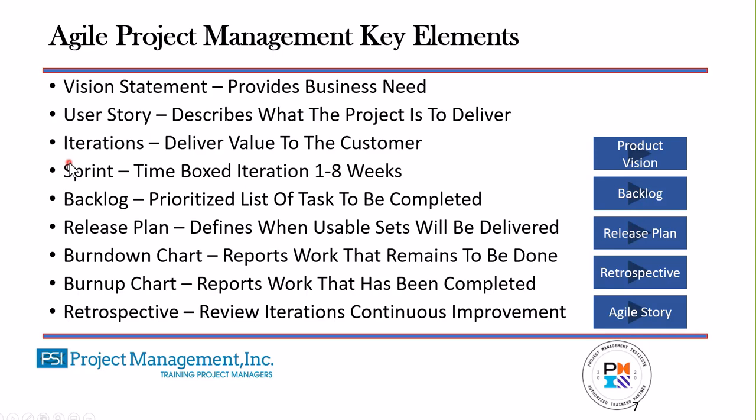In an iteration, we will deliver a backlog which has all those tasks assigned to it. In those tasks, what we do, we prioritize them. It's a prioritized list of tasks to be completed. The priority is based on what will deliver value to the customer the soonest.